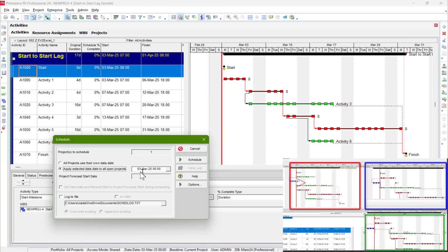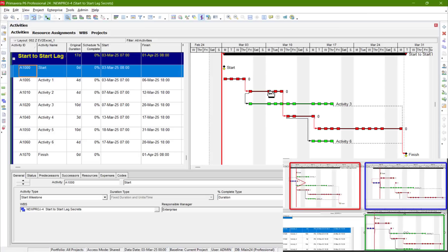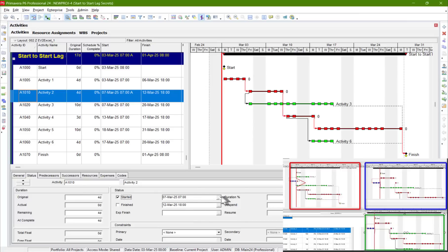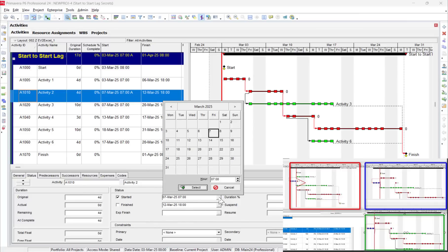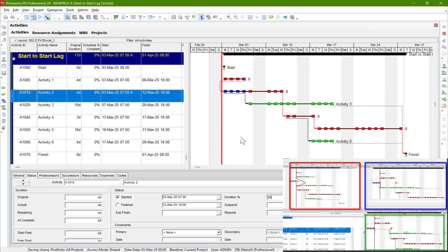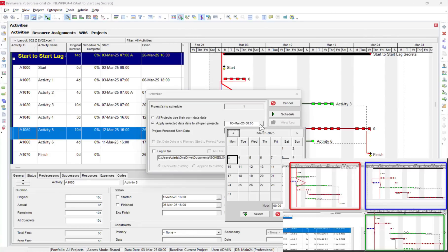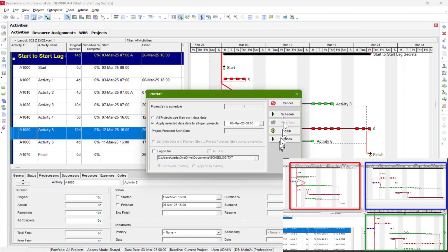Let's apply the schedule — the starting date of the project is there. Now let's assume that activity 2 started early because activity 1 has some obstacles. Let's say it started at the beginning of the project, 3rd of March, and let's say it finished 80% by 6th of March. This is the update.